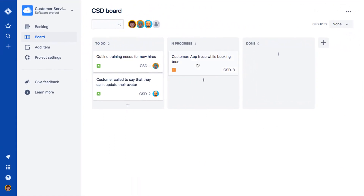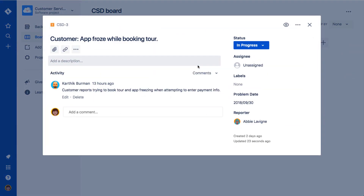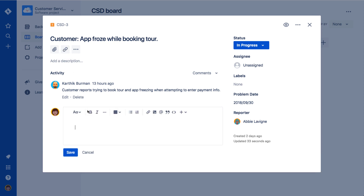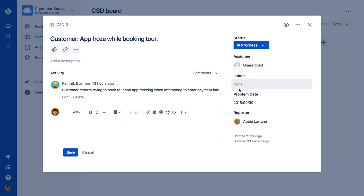On your project's board, click an issue. On the edit screen that opens, we can interact in a few ways including adding an attachment and a link, adding a comment, updating the status, assigning the issue, adding a label, and updating any additional fields.